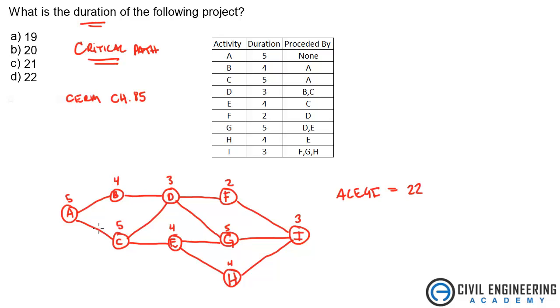Let's see if anything else beats that. Let's look at A, C, that's 10. D is 13. To G, 18. To I, that's 21. So A, C, D, G, I is 21.